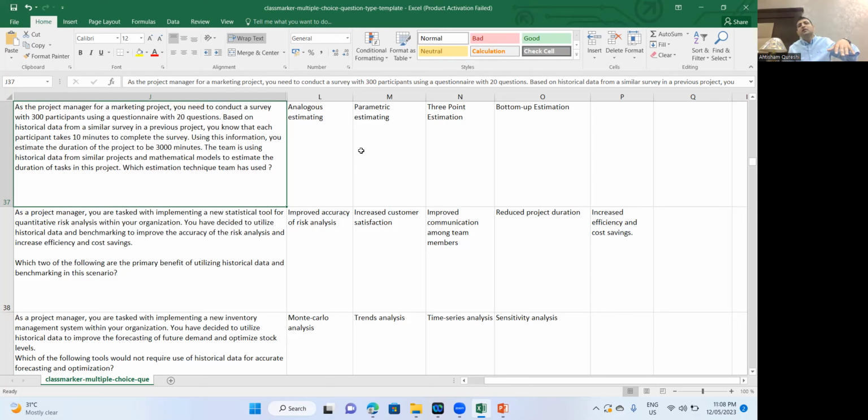That's something you have bought before, purchased before in some quantity, or some kind of work you have done before in some capacity or at some scope level. Now the scope has increased, so you can estimate that it took you X amount of time for this much scope, it will take you Y amount of time for the extended scope or reduced scope.